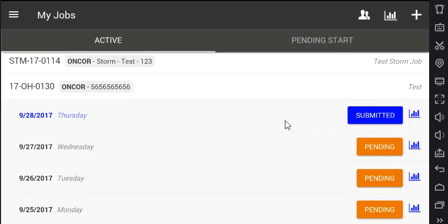For UnitsPro, you can configure it. Do you want to have a review layer, which would go to your next hierarchical level, supervisory level, general foreman, to review it, in which they can approve, modify, or reject the time, and then it goes to a project manager, or do you want to go in straight to the project manager? The project manager can come into the app and administer this, or they can go into the main application, which is what we're going to do here in a minute.